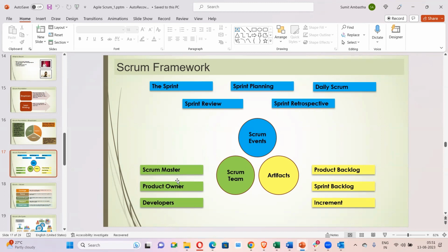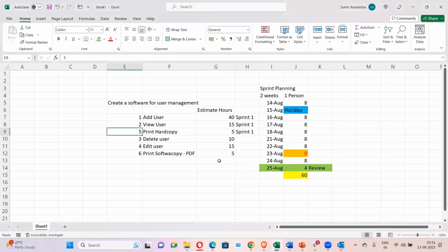So on the prioritization, on the one that you were showing us earlier, if you can go back to that page, to the Excel maybe. Yeah, we've been saying, for example, when we are developing or creating software, these are what we call functions or components. So for example, if you want to do the view user component or function, we have to do the add user first.